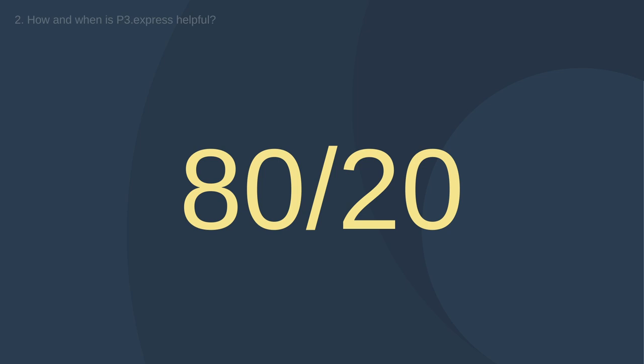For life-critical or very large projects, P3 Express is not really designed to cover those, though even for those projects using P3 Express is better than nothing. When it comes to project size it's mainly about the number of people working in the project, but also the diversity of skills and how people work together. For example, a construction project with 500 people is medium size and fine for P3 Express, but an IT development project with 500 people is really big and complex.